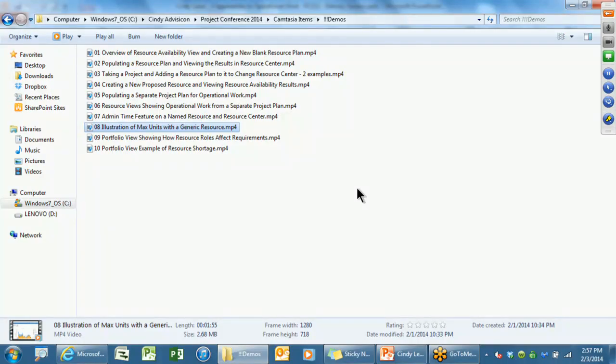Yes, go ahead. So one of the challenges we have is you use the resource plan and you build up a bunch of new project proposals effectively using a set of shared resources in a business unit. Then you look at the overall capacity and the forecast demand from all those projects, and you want to level it, manually optimizing how that's going to work. So you might have to move people between projects or reduce some of the resource available on a particular project and stretch out the timescale.